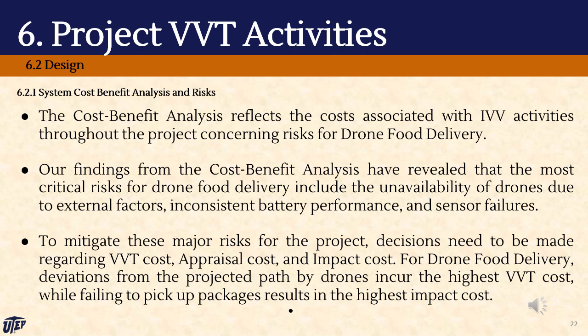During the design phase, the initial step involved conducting a comprehensive analysis encompassing cost, benefit, and risk assessment. Numerous risks crucial for meeting customer needs in the drone food delivery project were identified. These critical risks pertain to the availability of drones, external factors such as weather conditions, issues related to low battery performance, and potential malfunctions in sensors. Essential to this process was the estimation of costs associated with BBT as well as appraisal and impact cost, which played a pivotal role in determining the risk values attributed to the various challenges inherent in drone food delivery.